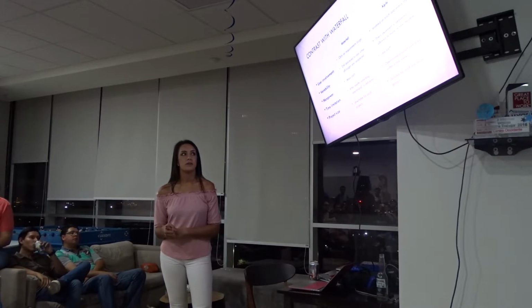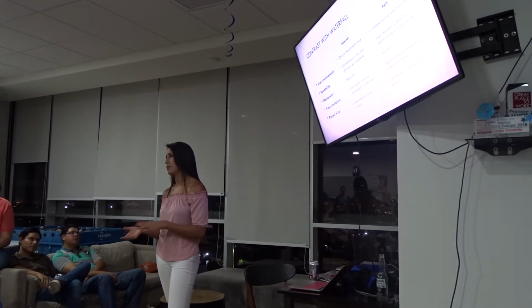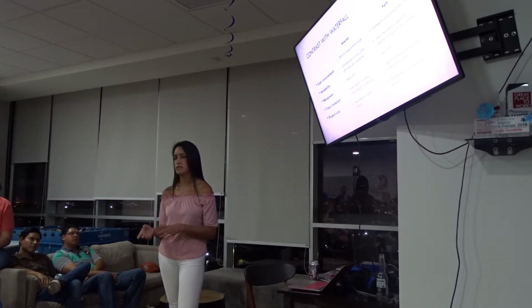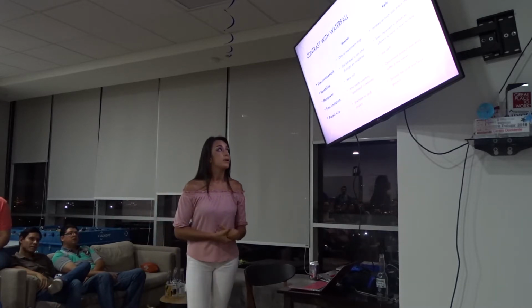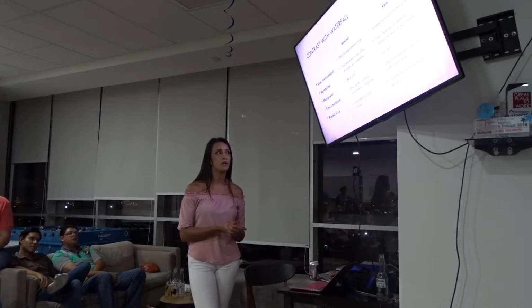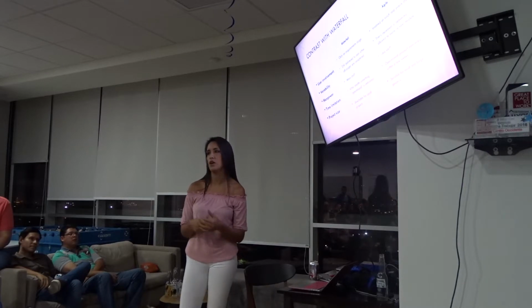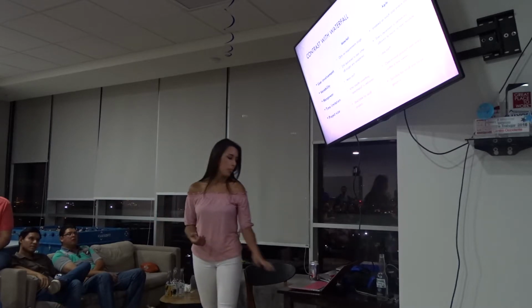And for Agile, you can deliver valuable pieces of what he's asking for within a few weeks, because you can work with sprints of 2 weeks, 4 weeks, depending on how you organize with your team. And for project size, Waterfall is not for a small project. That's more for huge projects, and Agile is more for small projects where you want to work on something fast, and you want something valuable and you want to see it.